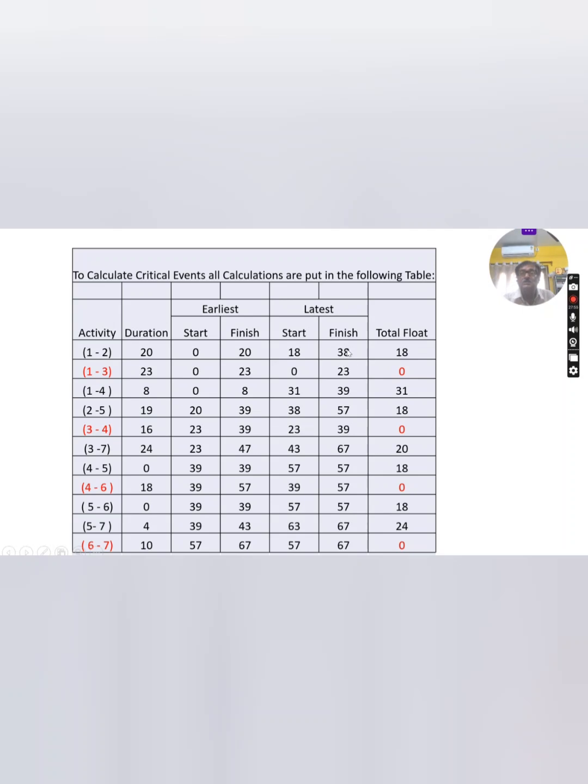And the latest finish time, you know this. For the latest start time, meaning the latest you can start, you subtract the activity time from the latest finish time. That is 38 minus 20, this is the latest start time. Here 23 is the latest finish time and the activity time is 23, so it is 0. This is the latest finish time 67 and the activity time is 24. If you subtract 24 from this, it will be 47. You can check this for all the activities. 67 is the latest finish time minus the activity time 4, that's why the latest start time is this. In this way you complete all the values.